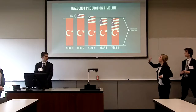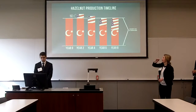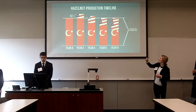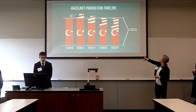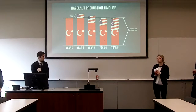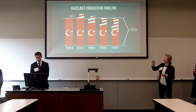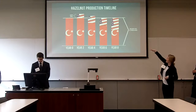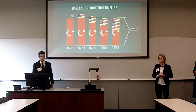And here's a more graphic design of how this will look. So in year 0, you can see that we have all of our hazelnuts being grown in Turkey. And then in year 2, we start growing the safety stock in Oregon. And then year 4 through year 8, we're going to increase production in Oregon to offset the amount of hazelnuts that we are producing in Turkey. And the line up top is the level production that we are aiming to stay at.